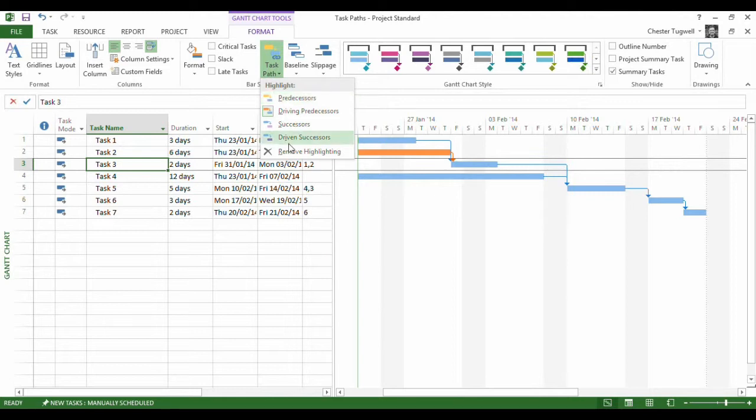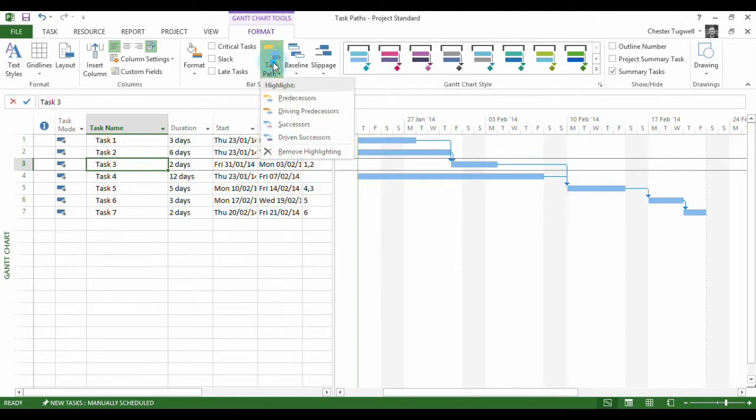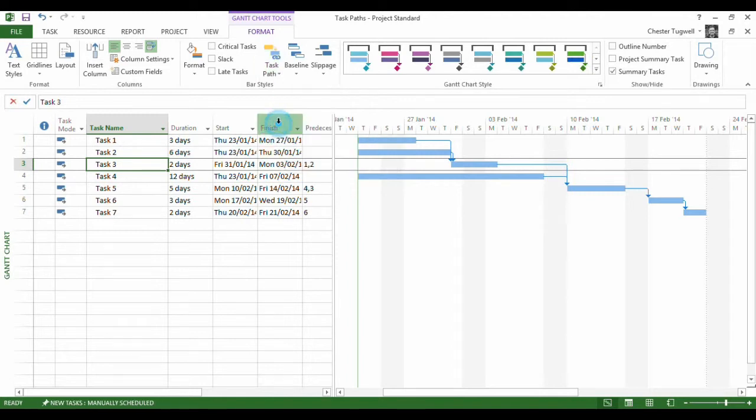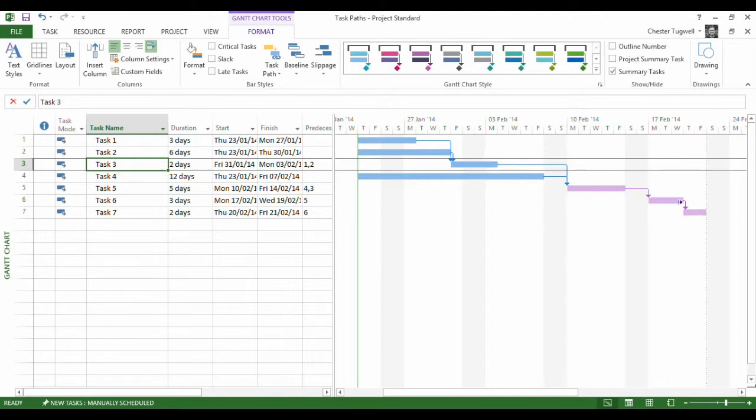Let's look at the successor option. I'm just going to remove the current highlighting, make it a little bit clearer. And I say, what are the successors to my task? Well, let's have a look. Now this one isn't because there is no relationship between this task and this task. But all of these tasks here are successors to this task because of the relationships that have been set up. You can see that in purple.